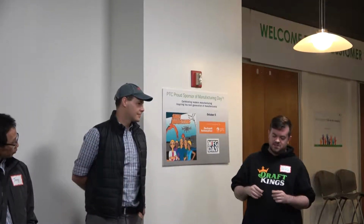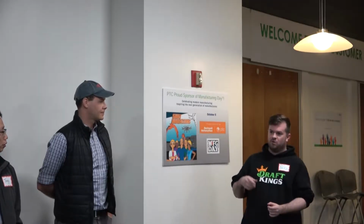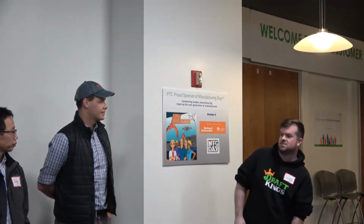So what we did was on the create transition for the ticket, we put in a post function. We're using an add-on called Jira Misc Workflow Extensions. I don't know, somebody installed this a long time ago, but it's quick and simple to set up. So we set up the script, conditionally executed. If someone says stakeholder urgency ASAP or interrupt this sprint, what it does is it fires off an email to me or my tech lead on the team and has the details parsed from the ticket of what it was, what it is, what's the urgency, and auto-creates the email for us.